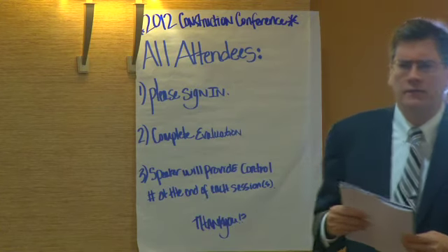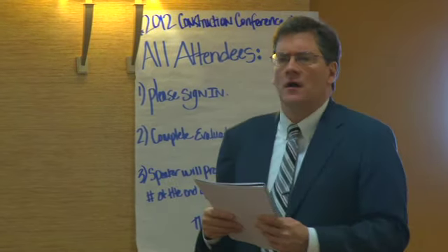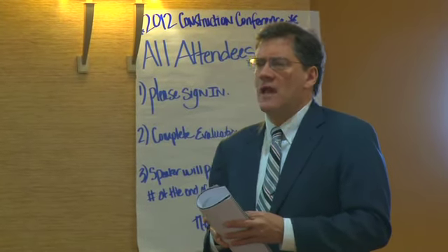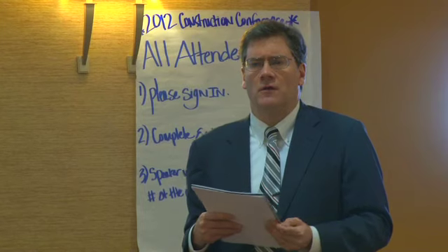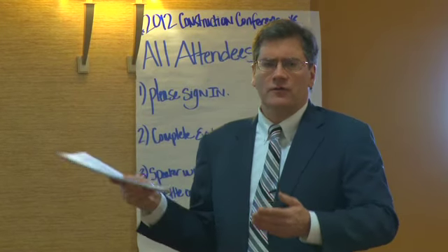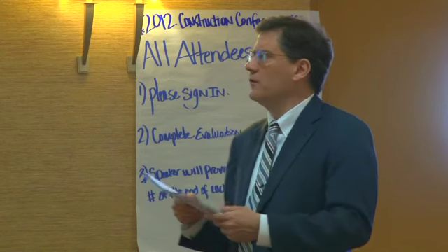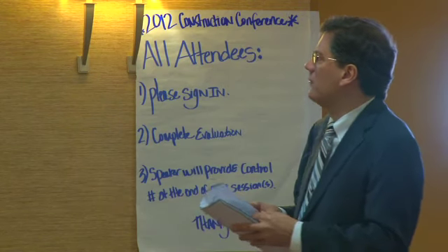We'll take bank drafts from general contractors. I haven't had a general contractor check bounce. And there's a treble damages statute in Arizona where you send a certified letter. If a $10,000 check bounces, you can sue for $30,000 if they don't replace it within the statutory time frame.